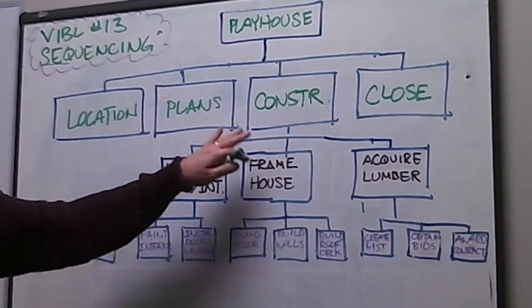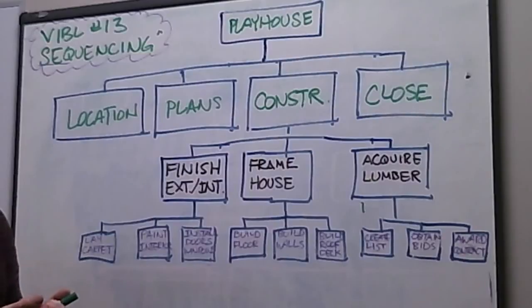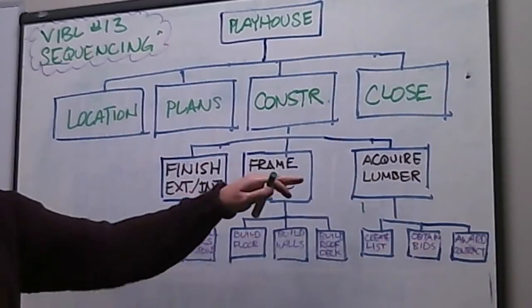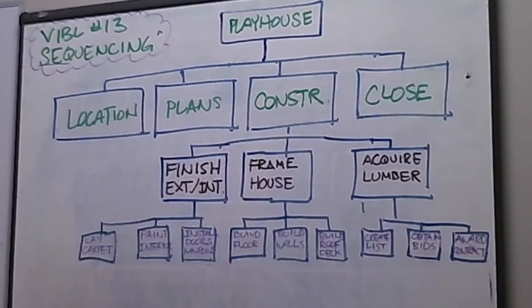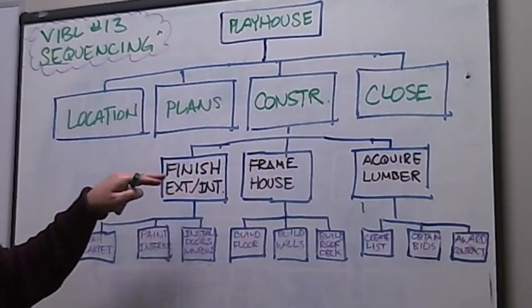This evening, I'm focusing on the execution of the project, this particular work breakdown structure, which I'm calling construction of the playhouse. It's got three work packages: acquire lumber, frame the house, and finish exterior and interior.